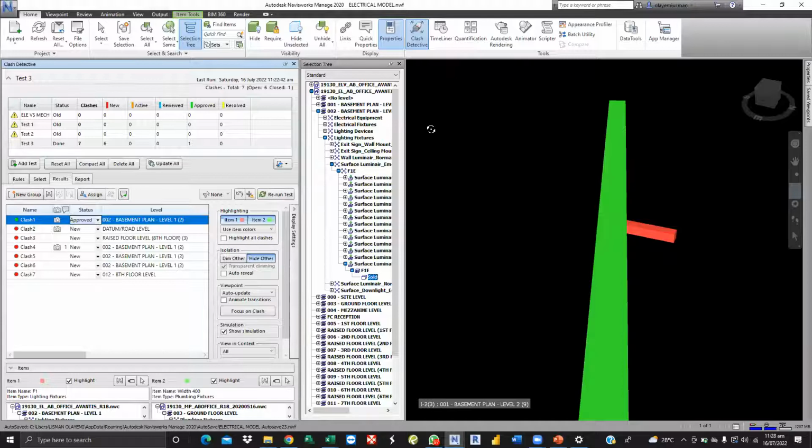My question is for electrical piping in wall. Can we call that a clash? For things like that, that's why I say there is something called false clashes or true clashes. If you are running electrical and architecture, and it is passing through a wall, which is supposed not to, it should pass through a duct. But if it is allowable in the wall by the structural engineer, when you highlight that, after assigning your clashes to the structural or mechanical engineer, he can easily say, okay, this can work, this can work. That's when you can actually approve those clashes.